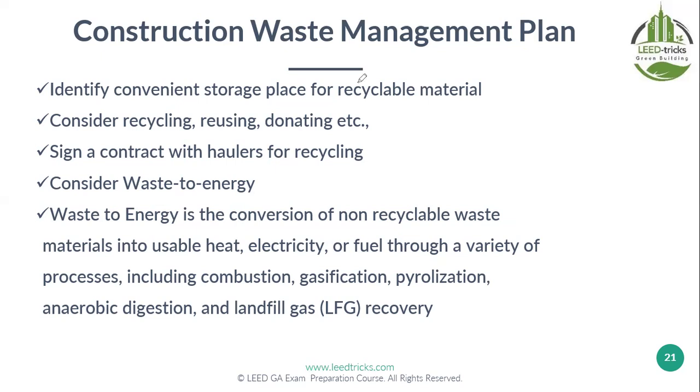In the plan, based on site visit, I identified the convenient storage place for recyclables, meaning material to be recycled. Then I decided which should be recycled, reused, or donated. Donation is also another way to reuse.